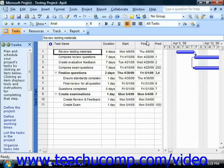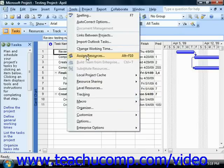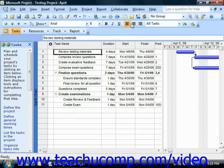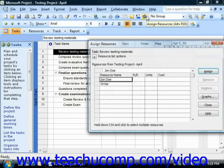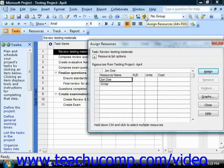Another way to assign resources is by using the Assign Resources dialog box in Microsoft Project. To do this, select the task in the project file to which you want to assign resources, and then either select Tools from the menu bar and choose the Assign Resources command, or click the Assign Resources button in the standard toolbar. You could also press Alt plus F10 on your keyboard if you prefer to use the keyboard shortcut. Either way, that will open the Assign Resources dialog box.